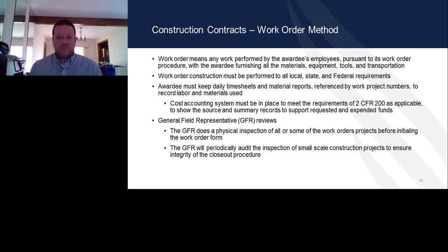Labor must be more than just something like John worked 4 hours on the 15th on this project. It has to go into what he was doing so that you can link his work with the approved purposes of the project and to what is allowed under the scope of the loan design.